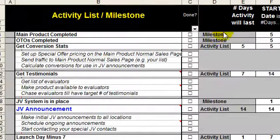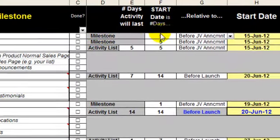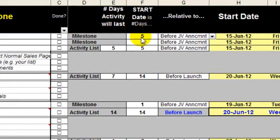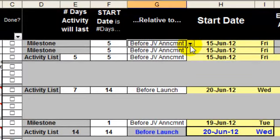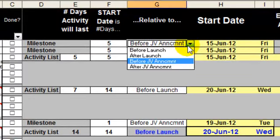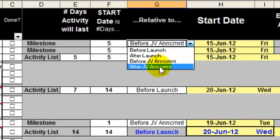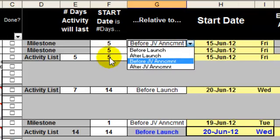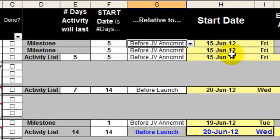There are two types of things here: milestones and activity lists. For a milestone, you specify the number of days before or after a particular date that you want the milestone to be at. You can specify before or after the launch or before or after the JV announcement, because those are the two key dates you need to care about. In this particular case, I've said that the main product completed milestone has to be five days before the JV announcement, and that turns out to be the 15th of June, which is a Friday.